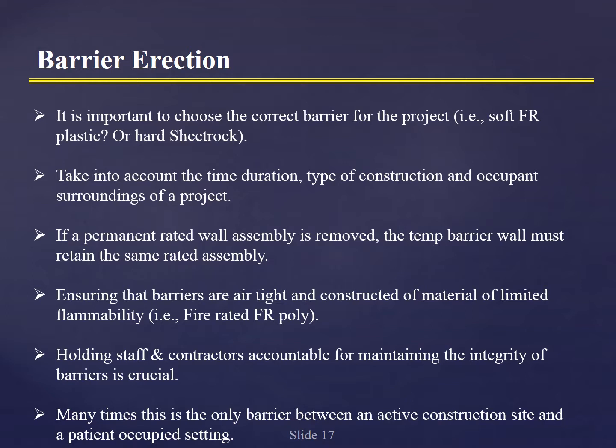And not only that, but the wall was taken out to the deck, and there was a ceiling where the patients were trafficking that had to be covered with plastic to seal it, because the plenum space above it was open to the construction site.